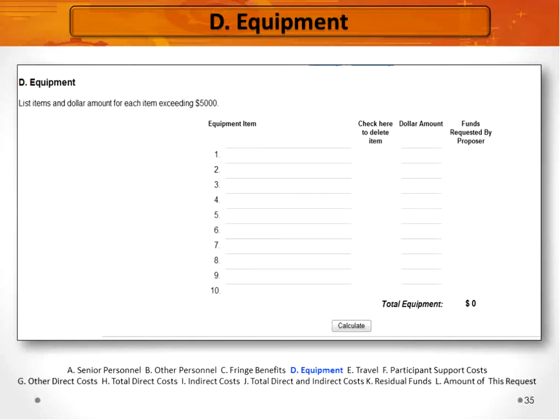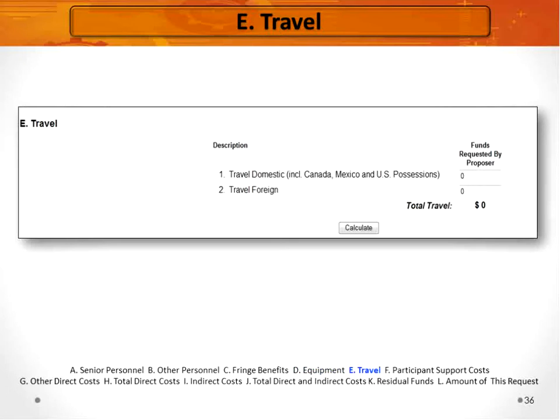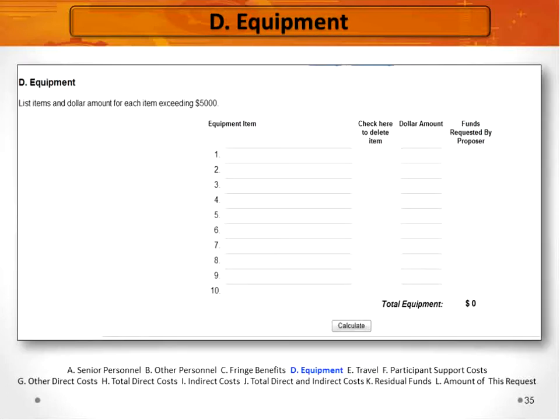So if you think about you need to use an adjunct, you're developing, let's say, a new program in wind energy, and there is no full-time faculty that has that expertise, but there is an adjunct who does, and you're going to start a new program with this adjunct faculty as the PI or one of the co-PIs. One of the things we would ask for is, would your administration write a letter that would be included in supplementary documentation that would state that if the program is successful and you get it off the ground, would you either hire that person or someone with equivalent expertise to keep the program running?